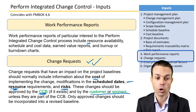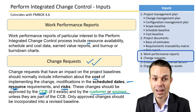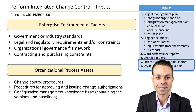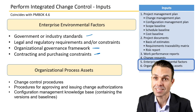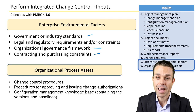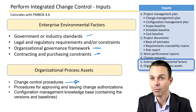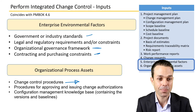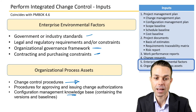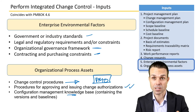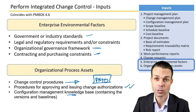Only approved changes should be incorporated back into your project management plan or revised baselined documents. With many of these things, we've got enterprise environmental factors and organisational process assets: any regulations or regulatory standards, contracting or purchasing constraints, and organisational governance frameworks in the organisation you're working in. There may be existing change control procedures or templates that help you — you just fill them in. There might also be a configuration management knowledge base or procedures for issuing and approving change authorisations already in place, such as those from a project management office.